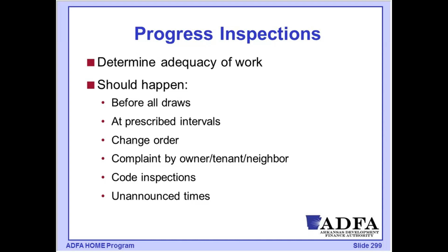Generally, these will also be done at prescribed intervals. We may, as part of the timeline for that project, have set some milestones in place. So it might be, as I mentioned, when walls are open, maybe before drywalling occurs, that we want to be able to go in and look at plumbing, electric, HVAC installs that have been done to make sure before they're covered up that things appear to be correctly done.